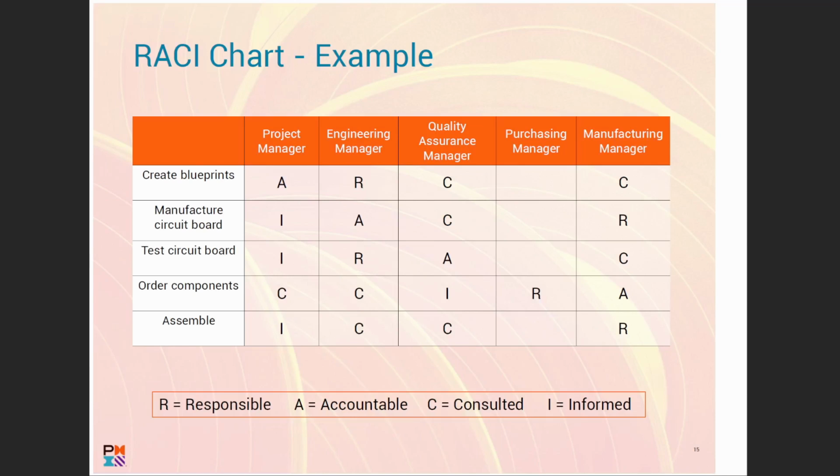be informed. So for the project manager, he's accountable for the creation of the blueprints. He needs to be informed on the manufacturing of circuit boards, testing circuit boards, and the assembly. And he needs to be consulted for the ordering of the components.